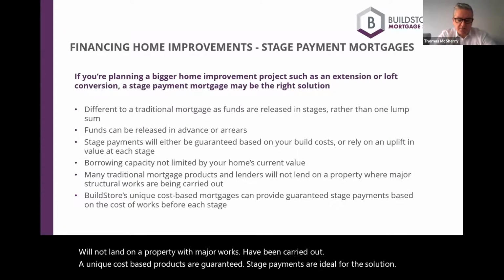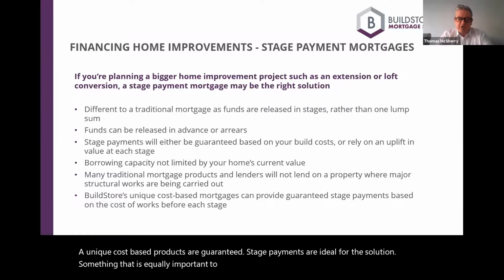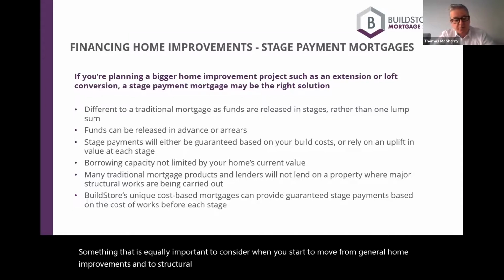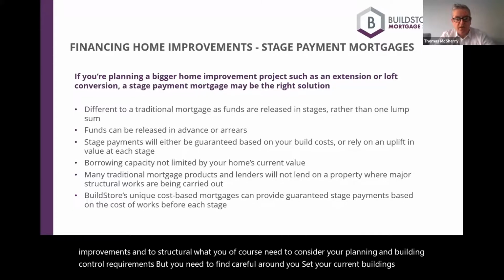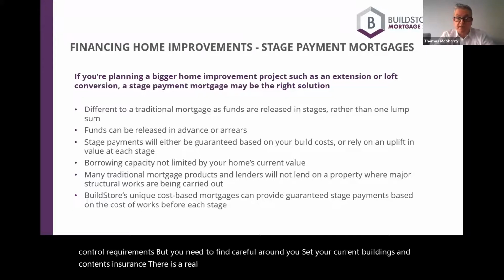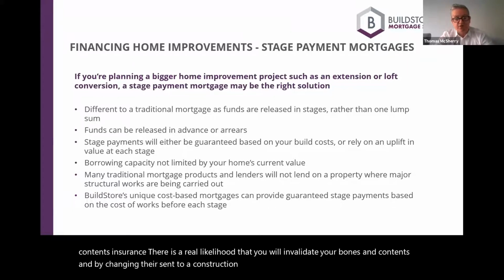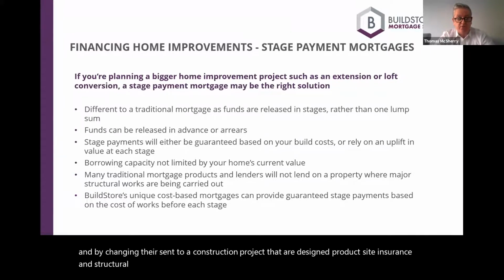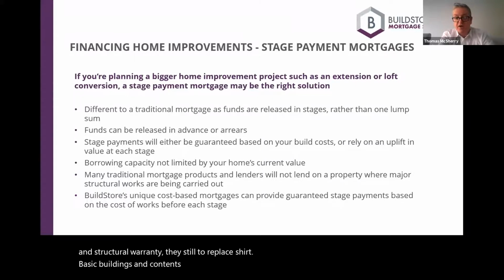Something that is equally important to consider. When you start to move from general home improvements into structural work, you of course need to consider your planning and building control requirements. But you need to think carefully around your current buildings and contents insurance. There is a real likelihood that you will invalidate your buildings and contents by changing this into a construction project. There are design products, site insurance and structural warranty that's there to replace your basic buildings and contents cover. So don't fall foul of that and start a project without the correct insurance in place.